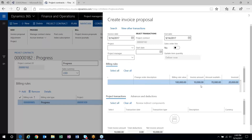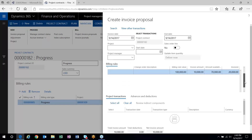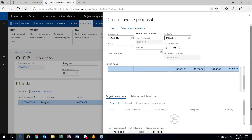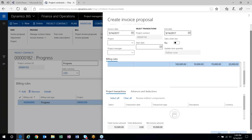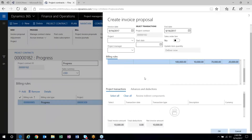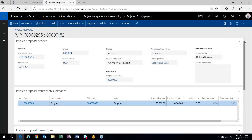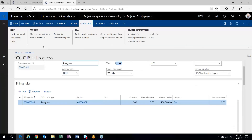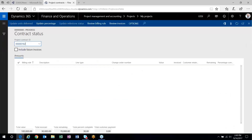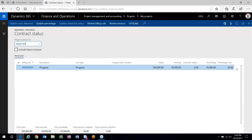The invoice proposal is for an additional $10,000. I go through and complete that process, and that invoice is posted. Looking at the Manage Contract Status form again, I've now invoiced $30,000 — 30% of that contract. So that's the progress billing rule in action.